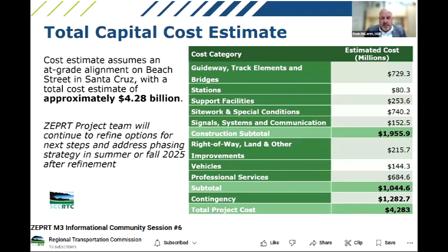So I guess first and foremost, to walk you through, this cost estimate is divided into a number of categories that are consistent with the way a project like this would be developed. And so when I say that, that's to mean that we have a lot of information that rolls up under each of these categories and provides an aggregate for certain types of activities. And then there are things such as contingency and professional services that go on top of that because they are done kind of holistically as it relates to some of the different activities that are included in here.